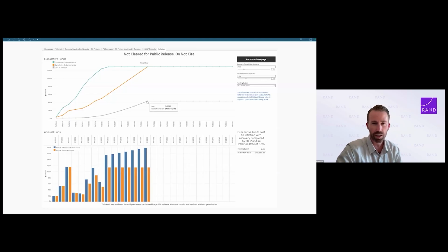So a reasonable next question is, well, who pays for that $426 million? And there's really 3 different answers to that. One is FEMA, of course, knows about inflation. They account for it in their cost estimates when they're writing the grants for these public assistance projects. And so one answer is that could all be fully baked in to the initial project grants that are coming out. And if that's the case, then it's covered. Me in the scenario as an official in the budget office doesn't need to worry about that.